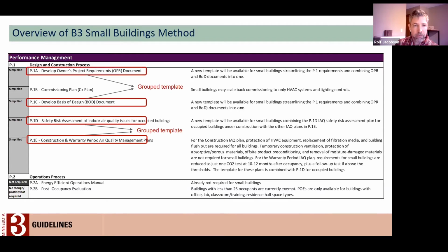Within the P1 guideline, there were some simplifications where we decided to group some of these guidelines into templates. So the OPR document and the basis of design document are both documents that are still required for the small buildings approach, but they've now been grouped together in the same template.